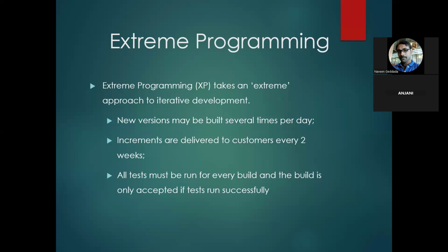So we will give the demo on the third day or the morning of the fourth day to the client, so that he will review the login screen, I mean each individual user story that has been assigned to you, and he will give his feedback. Whenever he gives feedback, you modify the changes recommended by the client, so you are maintaining a new version.